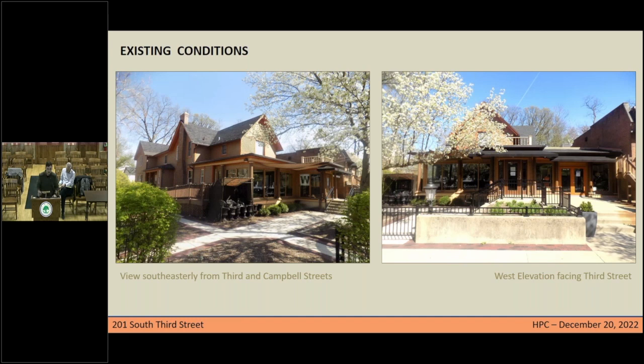So my name is Dylan Fuller, representing Global Power and Construction. We're the general contractor, and also a unique scenario where the owners of Global Power are actually majority owners of the proposed restaurant as well. It'll be called Mandrake, a fine dining and wine experience. We're pending approval today and are very close to pulling our full building permits. We'd be underway with construction hopefully early January, with a 3-month construction duration, pending some long lead items.